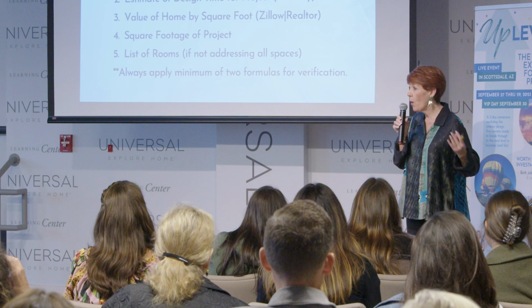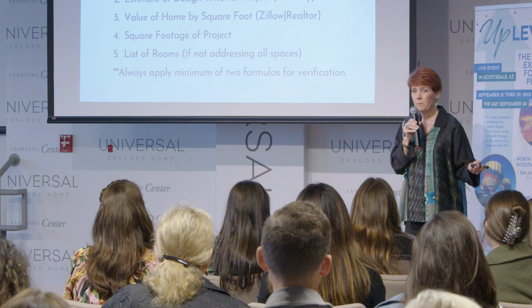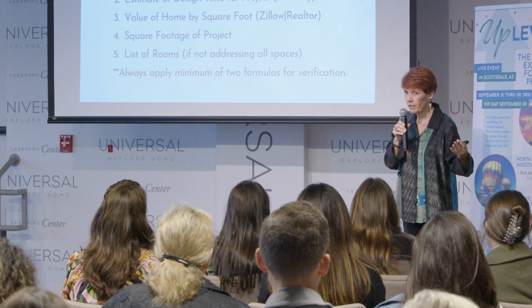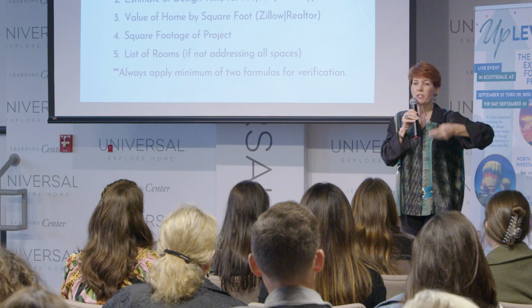Now, there are times a client will not give you a number. I know. I hear this a lot. So then you step forward and you say, in my experience, I expect this to be an investment of, you know, 250 to 350, 500 to 600, 50,000 to 75,000. The numbers can be all over the board. I usually like 50 to 100K ranges, unless I'm talking a really large project, a new build, something like that, then I'm going to go much wider ranges, probably a 250 range or something like that.